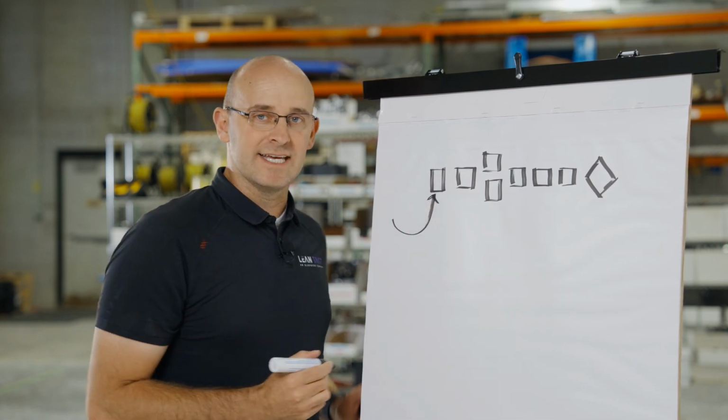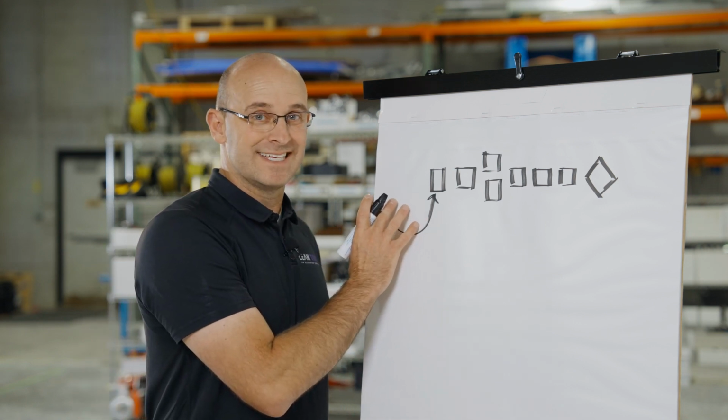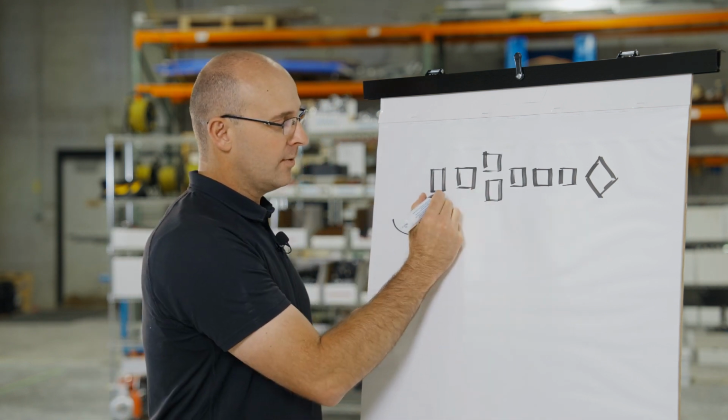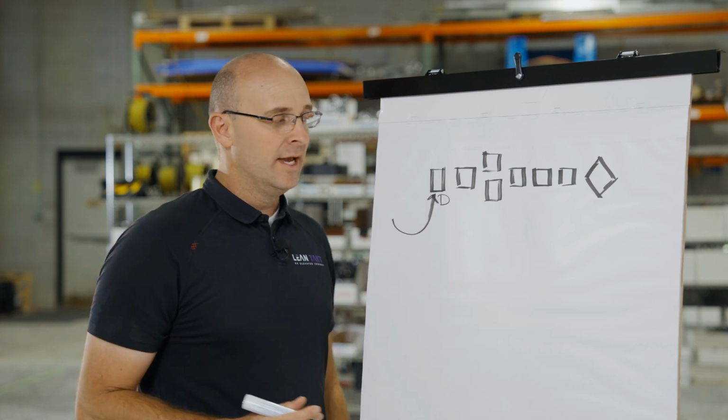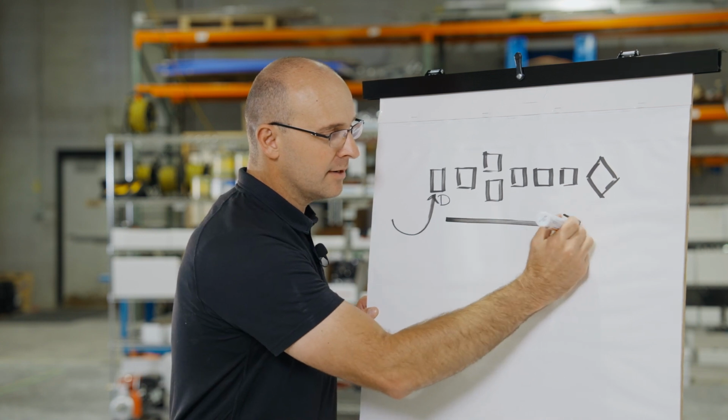Each one of these stickies is an activity, and what you do with the trade partners is get them in the right order, get the right duration for each one of them, and make sure that they're paired properly and that we have a good path to that milestone.